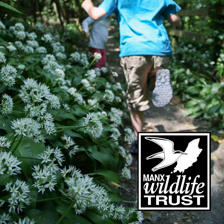We actually started building it in the spring, and we've obviously picked the right place because just after starting it, we had oystercatchers come in and nest right in front of it, which meant we had to stop the work because every time we came in, they were off the nest, running away. So we stopped, and they actually raised 2 chicks out of that nest, which was good. But now we can get back on and get that finished.